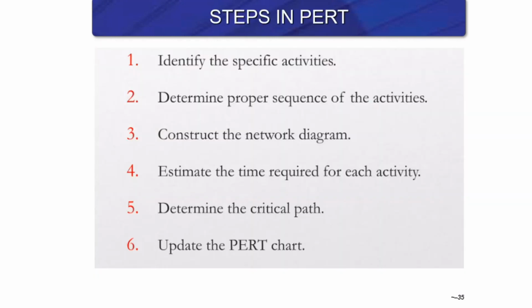Steps in PERT are relatively similar actually: identify tasks, determine the sequence of the activities, build up the network diagram, estimate the time duration of these different activities, and determine the critical path.